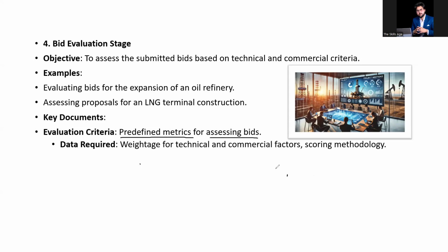Let's say you have 90 points, which company is going to meet that? There are safety points, there are engineering qualification points, there are previous project experience, like how many projects they have done already. So these points come cumulatively, they are going to add up, and then the company is going to decide that okay, this company is going to have 90, other companies 80.